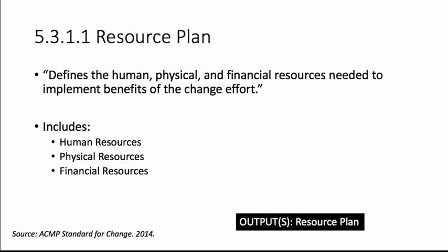To ensure that the correct resources fill key roles in the change effort, skills and capabilities must be defined along with the number of people required for each role. One person may have multiple roles depending on the scope of change, size of the organization, geography, and other factors. The next step is to perform a gap analysis to determine if the skills required exist in the organization and can be filled by a stakeholder, or if third-party service providers, for example consultants, will be required.